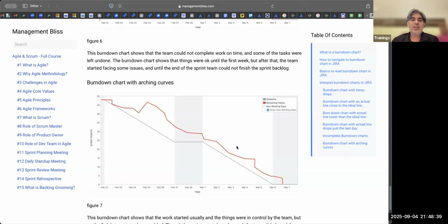Rework would typically happen once the sprint is done. If you go to the stakeholders and they say, oh, this is crap, or maybe on day 7 or day 8, they say, this is utter crap what we have built, then you will still close that story, but you will open a new story to do some rework. Or you could have a spillover. In the review itself, they will say, I'm not going to close the story. You need a few more things to do.